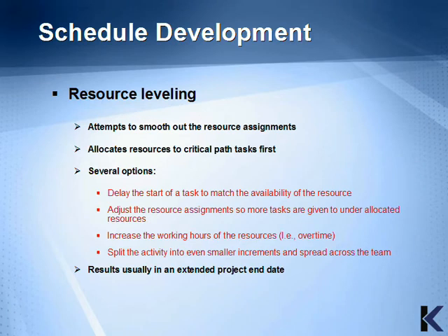You can delay the start of a task to match the availability of the resource. You can adjust the schedule assignments so more tasks are given to underallocated resources. You can increase the working hours of resources, that is, overtime, or you could split the activity into even smaller increments and spread them across the team. Resource leveling typically results in an extended project end date.